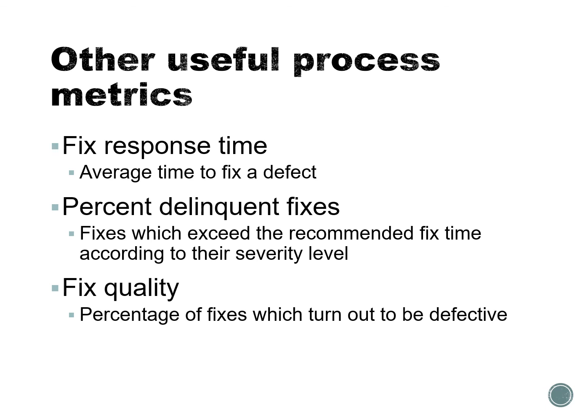And of course, if we want to find some things that are also useful but are not perhaps immediately obvious, these are things that are identified by the industry. So fix response time, how much time it takes to fix a problem. This was something that IBM was very interested in. The fix quality: how large a percentage of fixes have been defective? How many rollbacks have we done to fix our faulty patches? And how many problems are causing shutdowns or delays or things which are not very good if we are trying to run our software business or product in the way we intend to.